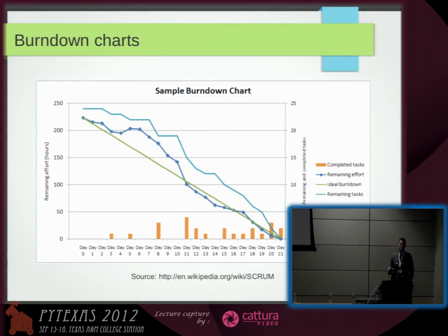You put some estimates on it, I use pounds, so you can show how many pounds or man days or whatever you made each sprint, so your manager can see that you're moving down towards 0, which means you'll be finished. The same thing happens here with the sprint burn down chart.